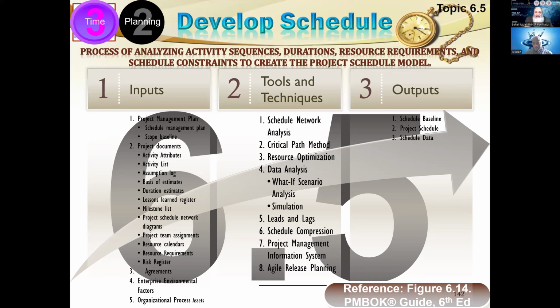We had all that data calculated in our previous activities: the names of activities, the durations, and so on. That is all data. So data and instances of the various schedules finally form a schedule baseline, which is the approved version of the schedule, which could be executed.